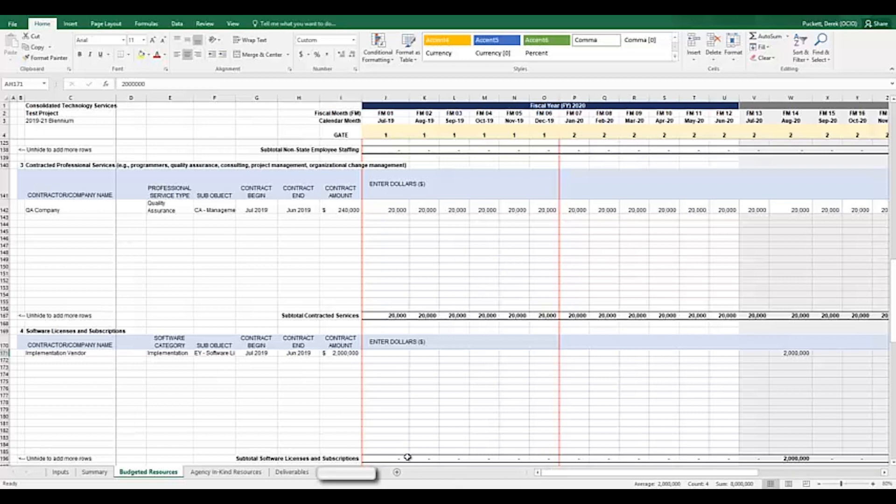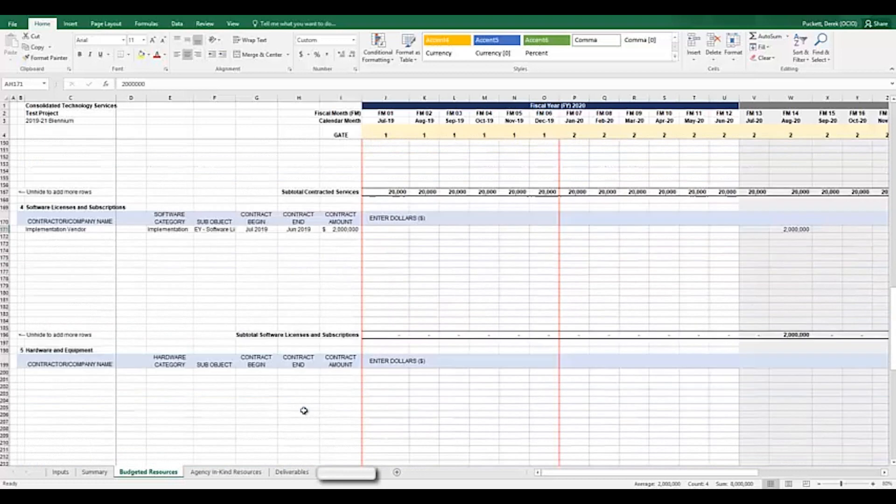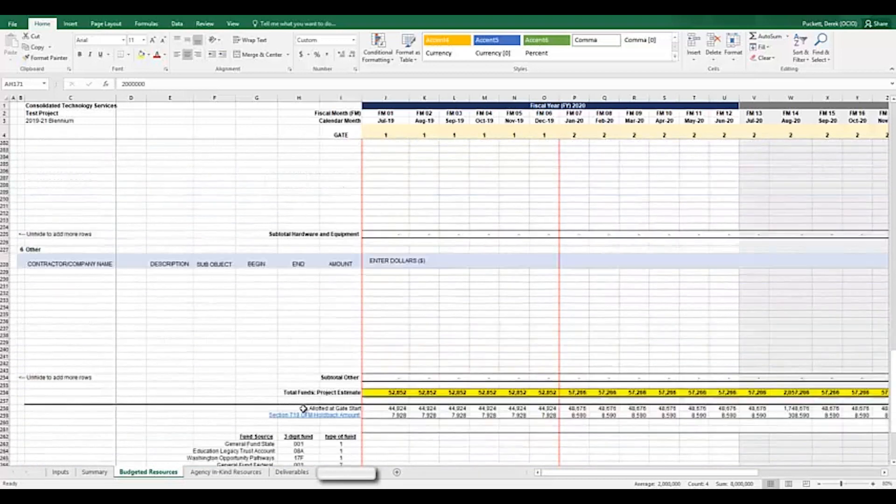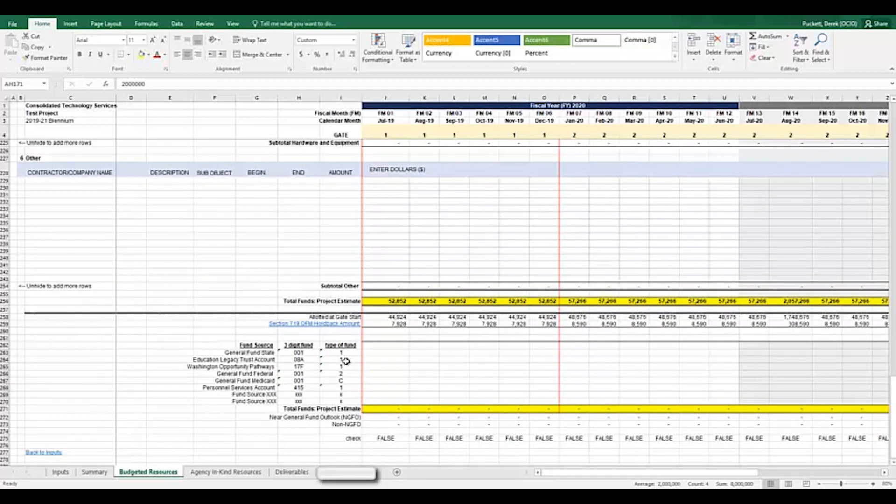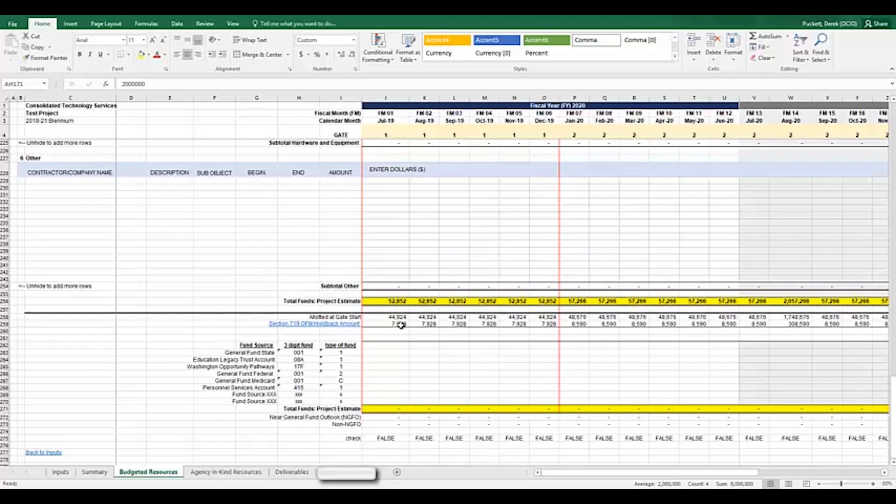When developing a technology budget, sections 1 through 6 must be completed to represent your total budgeted costs. Ensure that when you are completing this template, you are also populating the out-years as well. Scrolling towards the bottom of the book, you'll see some additional sections that contain running totals. In row 256, you can see through these formula values the total budgeted funds estimate populated by month. We have also incorporated the holdback amount and allotment amount as a formula in this workbook. These values are shown in rows 258 and 259. The holdback and allotment amounts are represented monthly. When those amounts are calculated and dispersed, they are done on a gate-by-gate basis. These rows are populated using formulas and no input is required. They are here for your information.